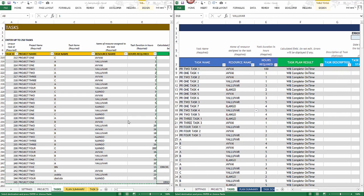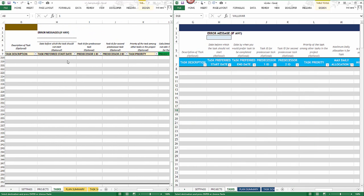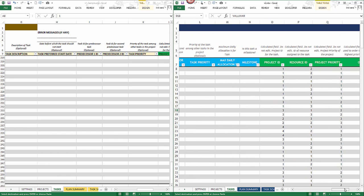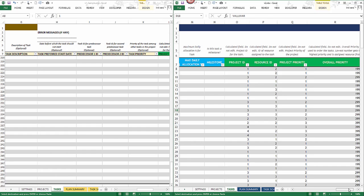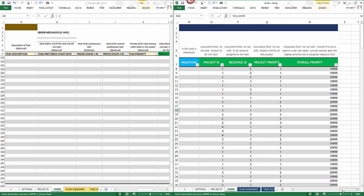The other columns can be copied and pasted from version 1 to the new version as-is. The task preferred end date is a new column in version 2, and there are a couple of additional new columns: max daily allocation and milestone. All other fields remain the same. As usual, please do not edit any columns colored in green — they are calculated fields and do not need to be modified.